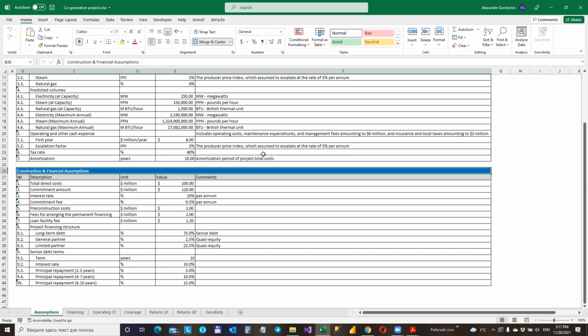The unused balance of 12.7 million is available to cover cost overruns or high interest charges, including the 3 million of reconstruction costs and 3.2 million costs of arranging financing. Total expected project cost is